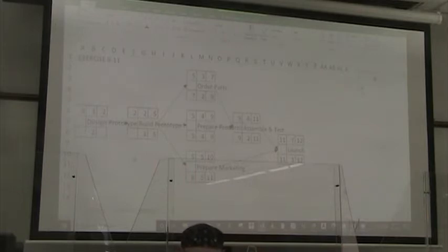Our late start for build the prototype is our late finish minus our duration,